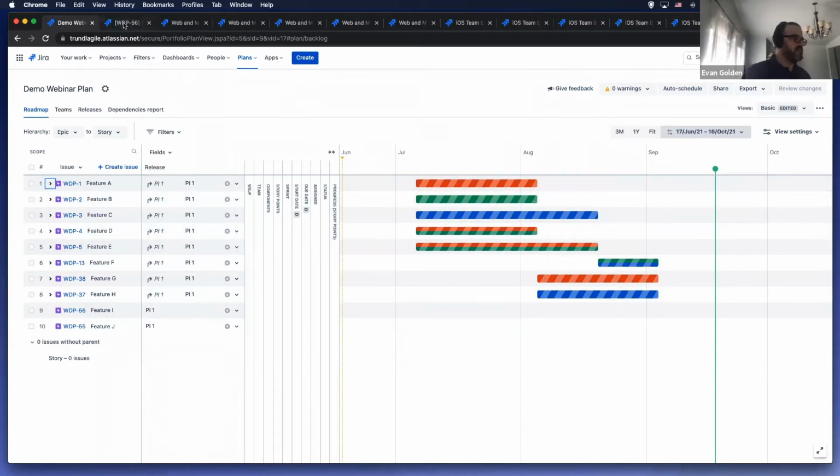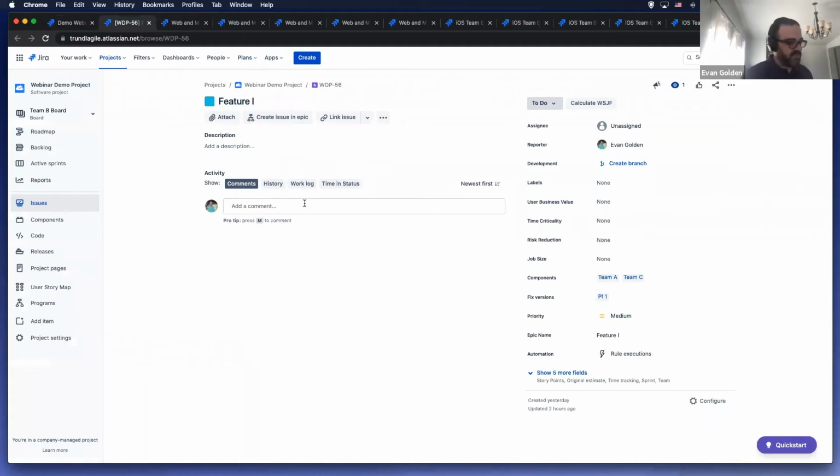And basically what this is, and I'm going to go into one of my epics. So basically what it is, it's a way of prioritizing or sequencing your features, right? And it includes a bunch of different fields. But it's not too difficult once you understand the basic calculation. So you have this idea of user business value, which is basically your relative value to the customer or the business. And then you have your time criticality, which is right here.